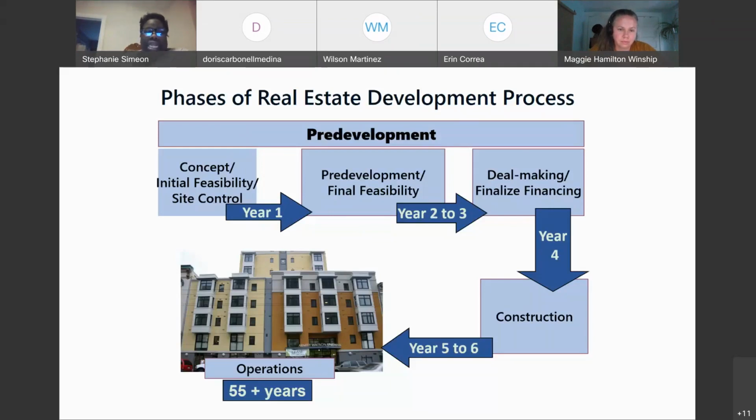For some of you, you may lose site control. You might have a designated developer agreement that ends within 6 months or a year. If they don't see that you got the project funded, you lose that status. So now you have to go out and actually get a purchase offer contract. That's expensive. The whole time you're in this phase of the residential development process, this is all on your dime. So from year 1 to when you actually put the first framing up or the first nail in the building, these are all out-of-pocket costs.